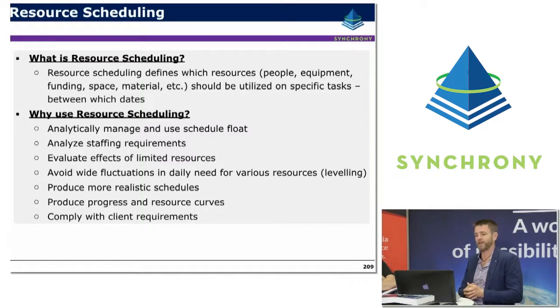Obviously, if you're not analysing the resources, your schedule's not going to be as realistic. You can produce progress and resource curves and comply with client requirements. And in particular, you can forecast your resource loads for the future, for if you do need to transition people to other projects or if you need to recruit and ramp up, you can create that picture from the schedule. It's very easy to graphically show that from the schedule once they're loaded.